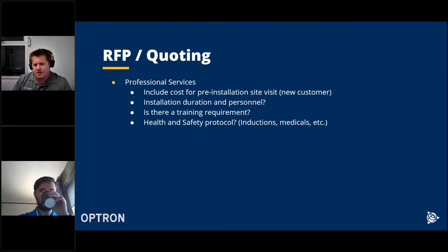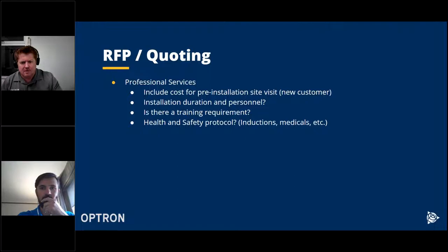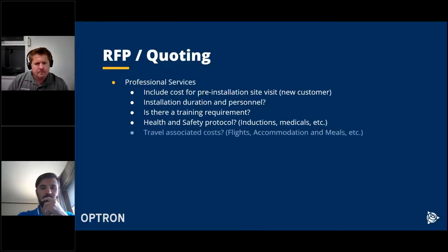On mines, generally, you have to do inductions, you have to do medicals. You need to take that time into account, because you need to have your personnel on site for that time, but you're not really getting any value for it. So you need to build that time into your quote as well.